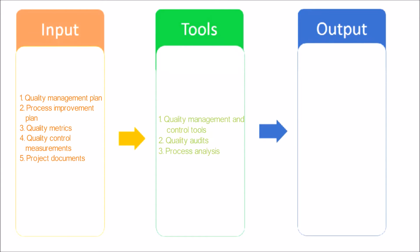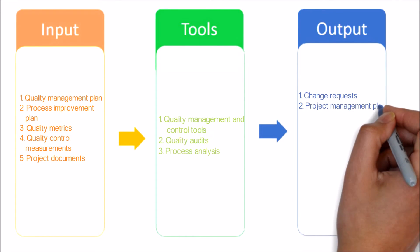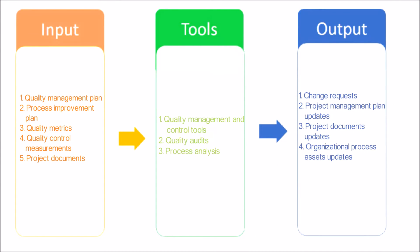Now let's see the output of this process. Change Requests - change requests are created and used as input into the Perform Integrated Change Control process to allow full consideration of the recommended improvements.